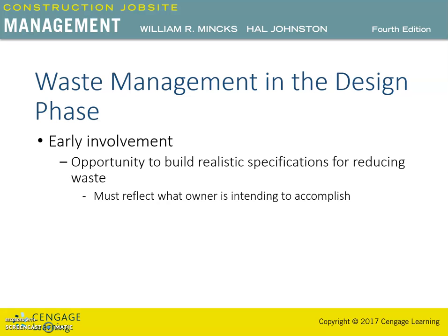The designers are typically aware of the physical attributes of materials. However, they don't usually consider the waste generated by the use of materials in the construction process. The contractor is aware of the efficient use of the material and its waste in each application. This insight can help the designers choose the optimal material for each particular use.